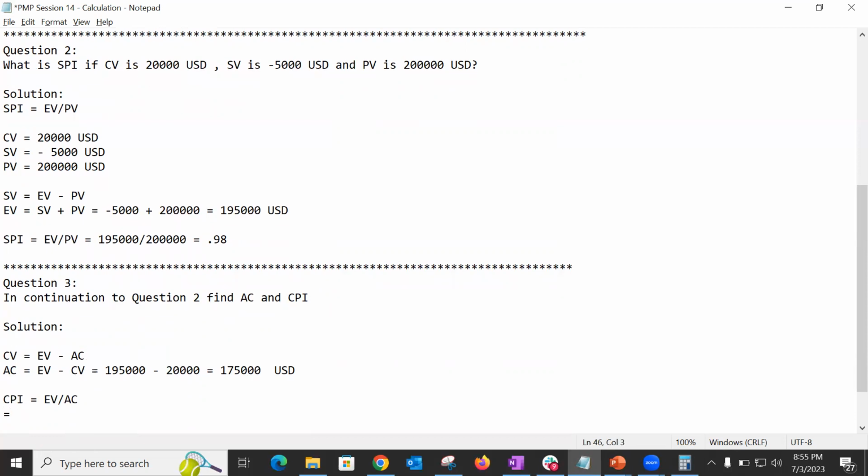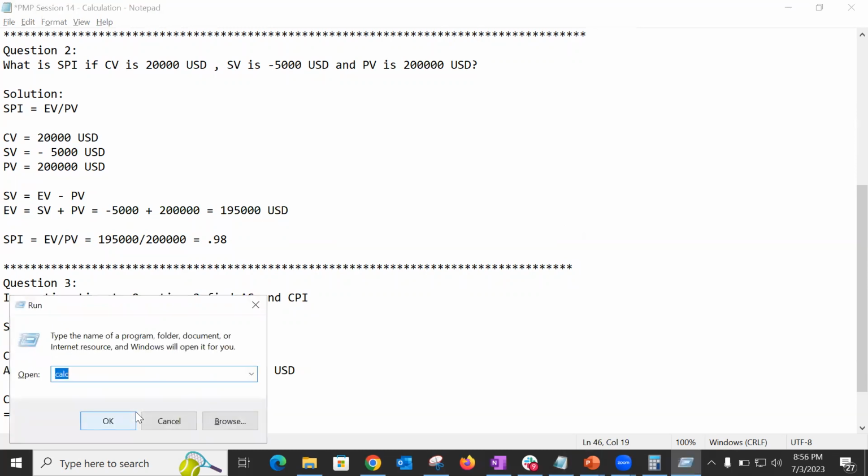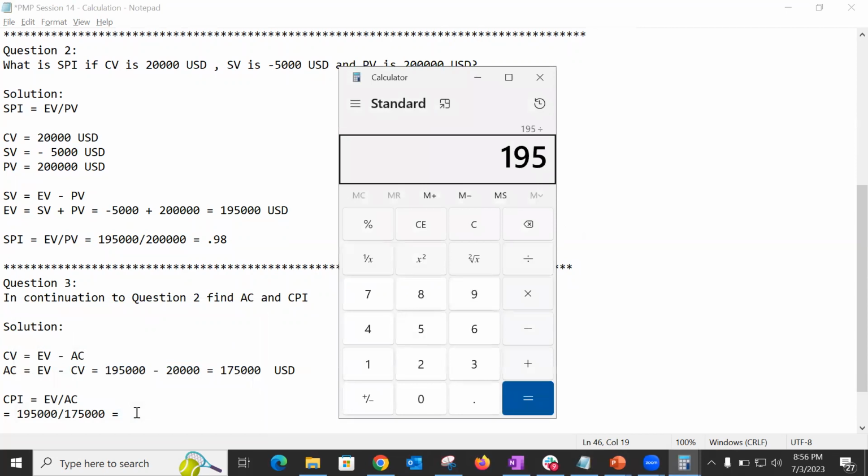EV is 175,000, divided by AC. Sorry, that is AC. I'm sorry for this. So EV is 195,000. Sorry, I just missed that. And divided by AC, that is 175,000. So EV is right here, which is 195,000, and your AC is right here, which is 175,000. So 195 divided by 175, and that is 1.11.